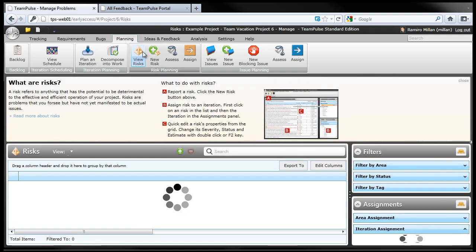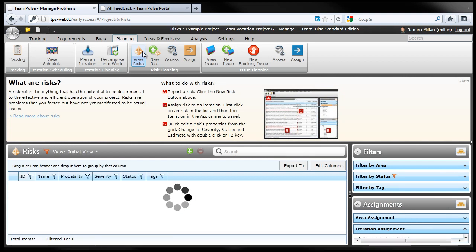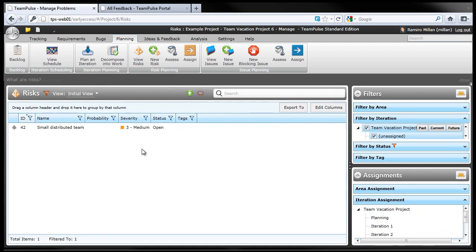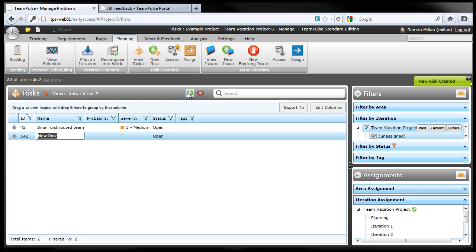I'm not sure, right? As you can see, I have a really big gap between the probable and the pessimistic view. And the reason is I'm really unsure of what might happen by going to different language support and how we'll deal with keyboards. So I'm going to go ahead and actually create a risk, because again, I'm not sure. And I have one to assess.